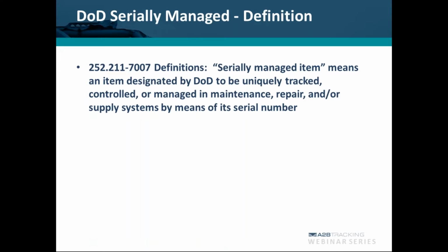And it's important to note that the property as subcontractors must be reported also, and any changes in status, mark, custody, condition code for repairables only, or disposition of items that are received by the contractor, delivered or shipped from the contractor's plant under government instructions, except when the shipment is to a subcontractor or other location of the contract. So you don't report those changes, just the changes where you lose actual contractual custody of them.